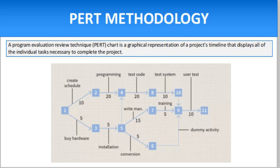A PERT chart uses circles or rectangles called nodes to represent project events or milestones. The nodes are linked by vectors or lines that represent various tasks. Dependent tasks are items that must be performed in a specific order. For example, if an arrow is drawn from task number one to task number two on a PERT chart, task number one must be completed before work on task number two begins.